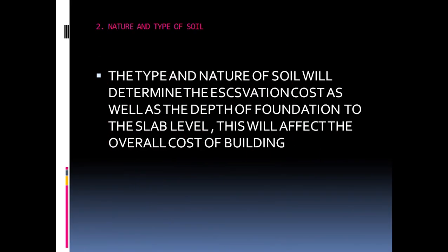Next, nature and type of soil. So the type and nature of soil will determine the excavation cost as well as the depth of foundation to the slab level. This will affect the overall cost of the building.